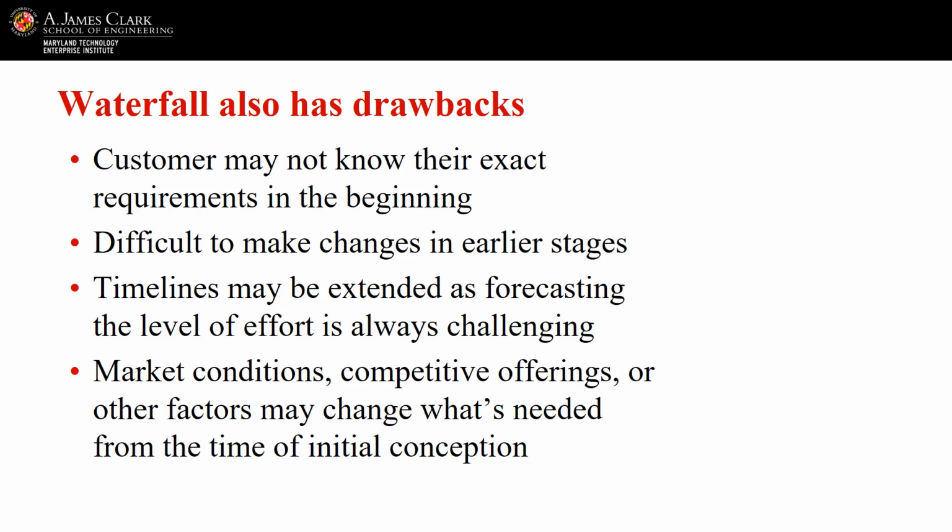These problems include the following. Because Waterfall focuses on specifying and building something complete rather than on fast iterations, what you build initially might not meet the customer's needs. And by the time you have a new version addressing their needs, you might find that the customers have long since stopped using your product and sought out another answer.